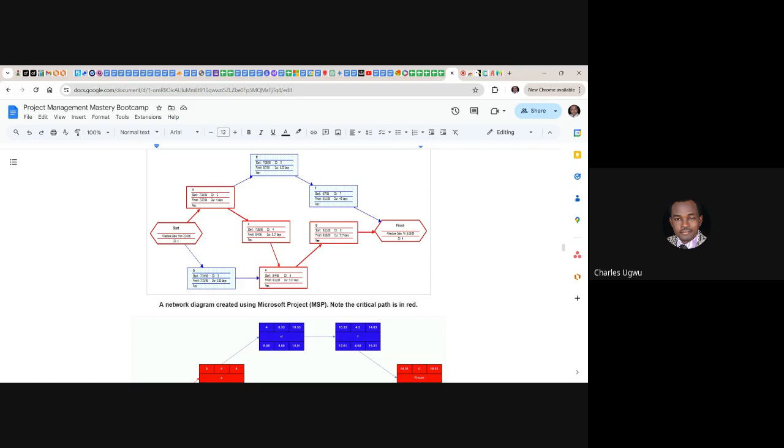But some people working on this area can say, well, I'll be off for 2 days. You look at your calendar and see if 2 days here, if this area is delayed by 4 days, is it going to be too bad? You find out that it can be delayed for 2 days and still nothing. It's okay, no problems. By the time you come back from your 1-day annual leave, you still have time. So it's not a headache to you.